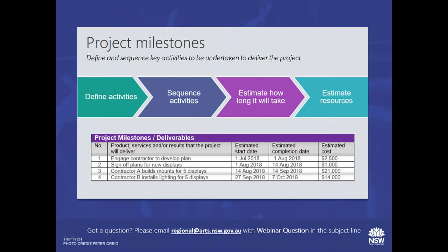Indeed. So make sure you give sufficient detail in the description area so that the assessors are not guessing and they can fully understand what each step involves. Make sure that the costs here reflect your budget, so make sure there's no discrepancy there. The milestones should be as accurate as possible and should represent a realistic work schedule that you could use in the event that you were delivering your project, and it would help you keep it on track.